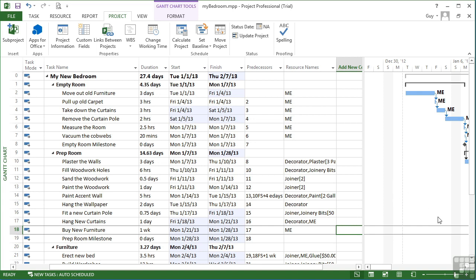And you can see that Saturdays are now not grayed out because they are actually a working day and some of the tasks fall on a Saturday, whereas Sunday is still grayed out because that's still fully a non-working day. So that's changing the standard calendar to affect the display here in the Gantt chart and all of your working resources.